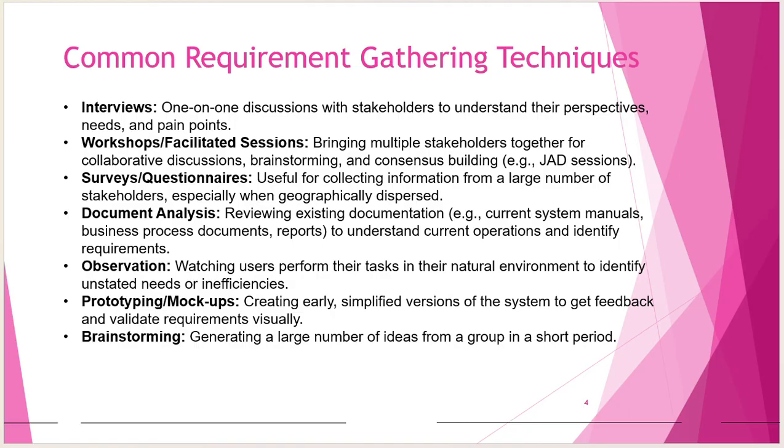Then the workshop and facilitated sessions, bringing multiple stakeholders together. That's important. There are multiple stakeholders for collaborative discussion, brainstorming, and consensus building. If we do interviews with individual stakeholders, different stakeholders may give us different opinions, and we don't have a common opinion for all the stakeholders, and we don't have group communication.